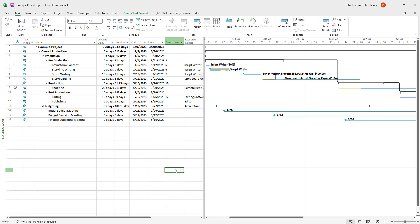Over here you can see that I have a bunch of tasks. Sometimes you may want to inactivate some of the tasks and then reactivate them later on. So if you don't want to completely delete a task, you can inactivate them — they'll be removed from the task list and they'll not be counted in the Gantt chart as well.